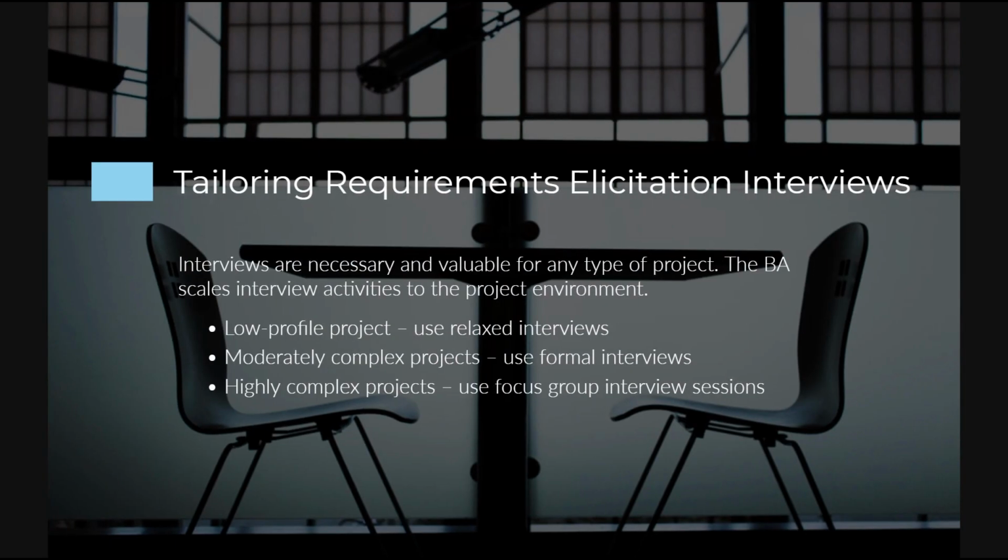Interviews are necessary and valuable for any type of project. You should be scaling the interview activities to the project environment. So you can have typically 3 different types of projects: a low profile project, a moderately complex project, or a highly complex project. A low profile project, for example, the interview can really be handled through informal discussions with users, right? Like you don't need to have a formal session on what's probably a low profile, low risk project.